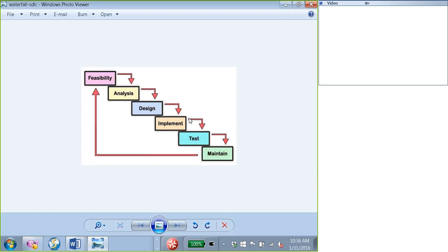And the Waterfall Model always recommends that when you have initiated a particular phase, you cannot move forward from one phase to another until you are 100% complete on that phase. So for instance, if you are working on the scope phase, you have to define the scope clearly. You have to exactly identify the entire scope. Until you are clear with the scope definition, you cannot move forward with the requirements analysis or requirements gathering.